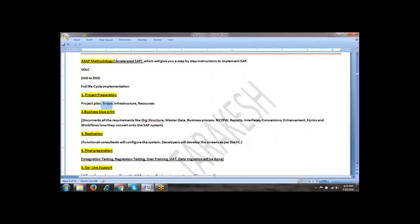And the second point is scope. What is the scope? What are we going to implement? What are we going to cover in this particular project? In scope and out scope. In scope is nothing but what are the modules we are going to implement now - for example, SD, MM and FICO or HR or PM or PP. And out scope means what we are not going to cover in this particular project. Then they will decide infrastructure. What do you mean by infrastructure? What server landscape is required? How many hardwares are required? How many softwares are required? The complete information will be decided here.